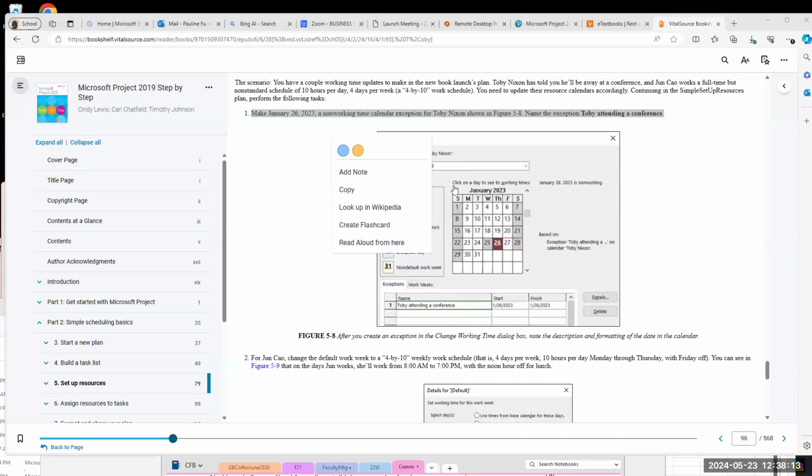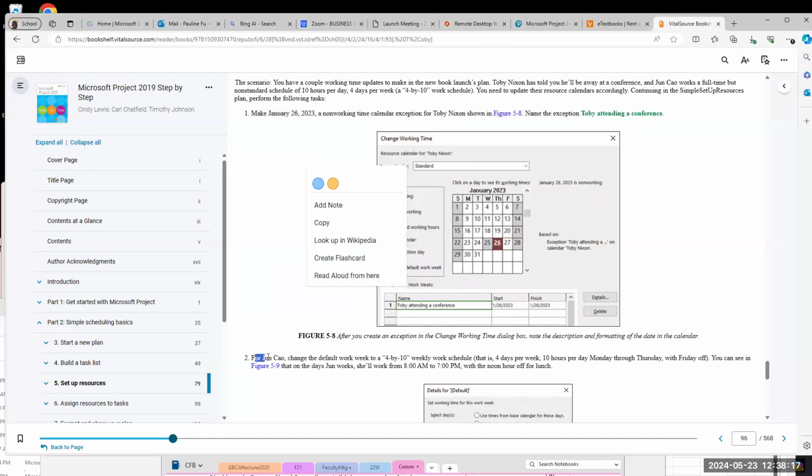All right, questions? Next, we are going step 2 for Juncao, change default work 4/10 weekly schedule. Means 4 days a week, 10 hours per day, Monday to Thursday.